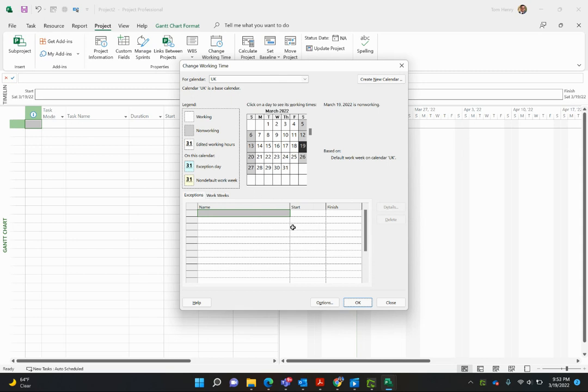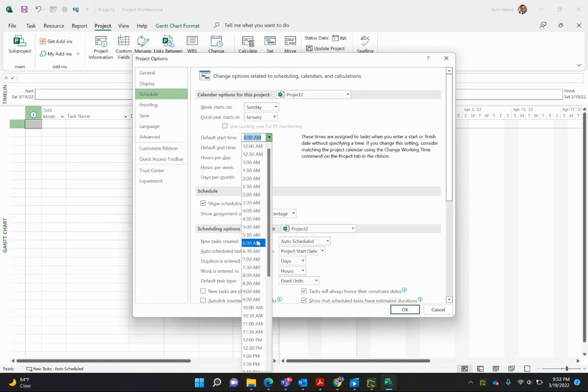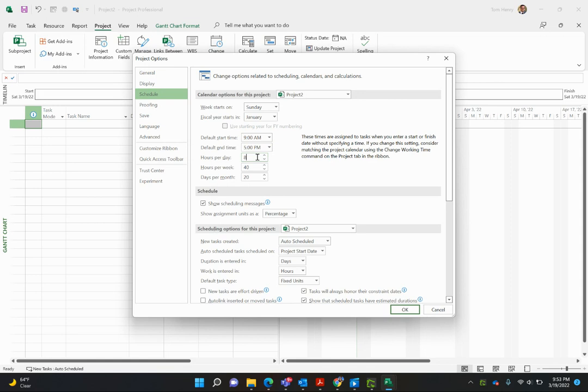I want to come in and change the working time. For the UK, I'll click Options. I can say what time do I start? Well, we generally work nine. Some companies work nine to six with an hour for lunch. We'll go nine to five. Actually, you take a 30 minute lunch break, so the hours per day is actually 7.5.